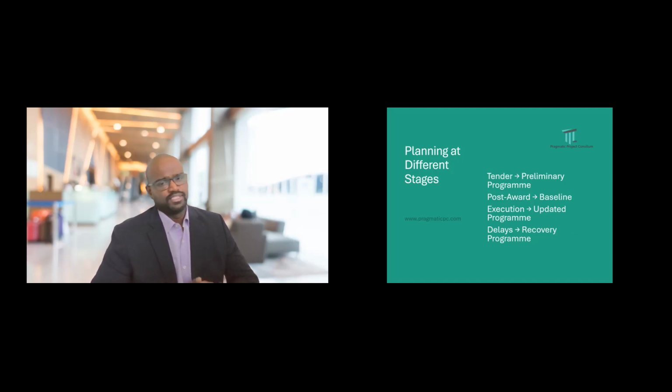Planning is different at different stages. It always depends on the visibility and the available inputs. At tender, the contractor makes a schedule, so he has a certain visibility and level of detail. The tender schedule is the basic program which is usually signed along with the contract. But after the award of the contract, the baseline will be prepared and submitted. Once the baseline is approved, it will form the benchmark of project measurement till the completion of the project.